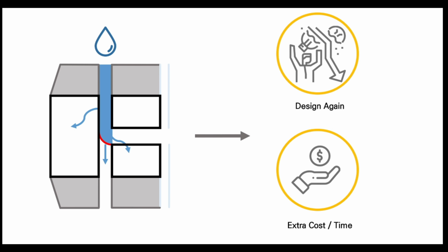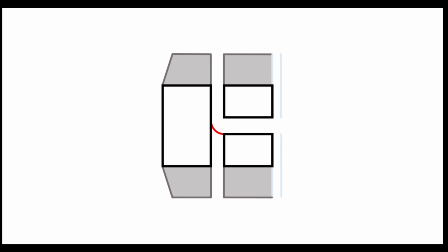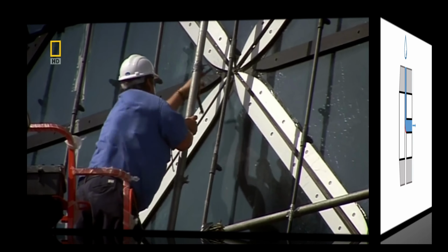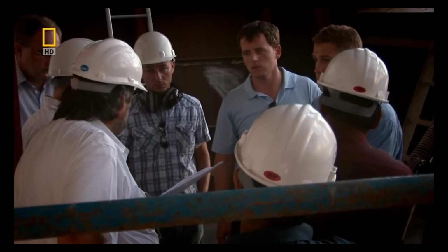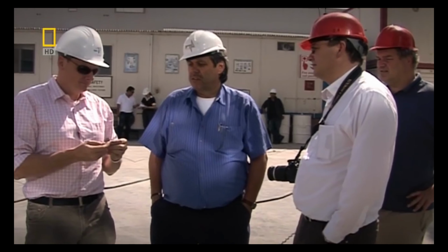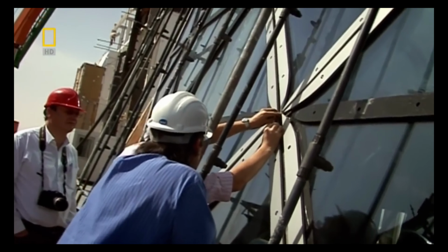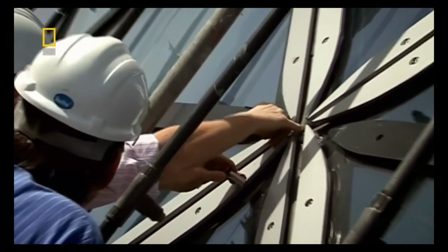Luckily, it wasn't a design failure. The drainage tube had been blocked with sand. Once it was removed, the construction could proceed. Even a small risk like this could cause devastating results in the future, and thanks to these tests, they were able to take precautions.